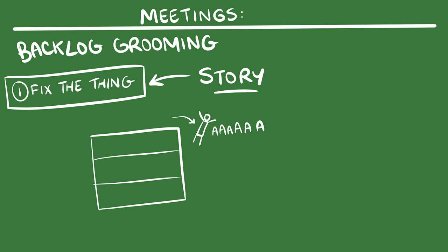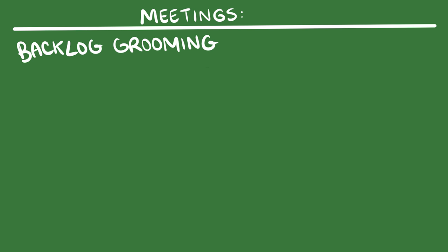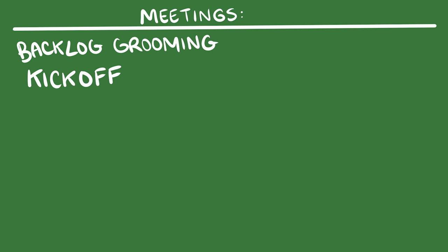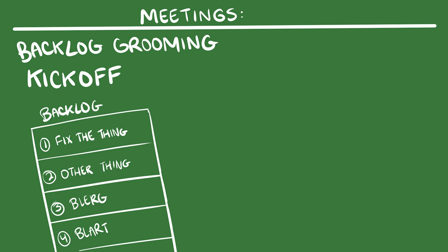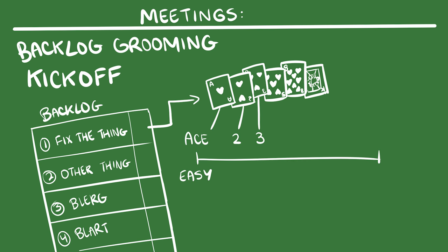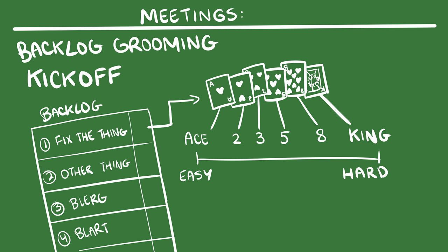The backlog grooming happens before the sprint starts, to prepare everybody for the kickoff. During the kickoff meeting, the product owner is kicked very hard. Then the team cracks open the backlog in approximate order of priority, and uses planning poker to estimate the difficulty of each task. In planning poker, after hearing the description of each task and asking any clarifying questions, the team all assign the task a difficulty of ace, two, three, five, eight, or king. This also provides the scrum master with a hearty supply of useless 4, 6, 7, 9, 10, jack, and queen cards that he can use to erect impressive if delicate structures.